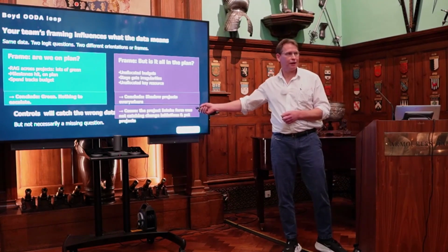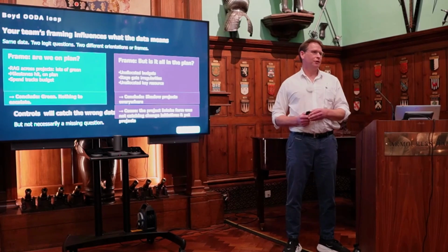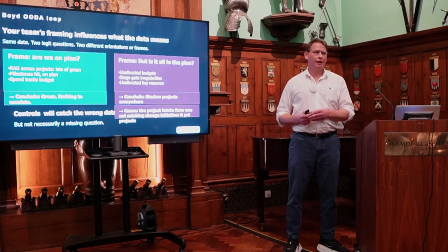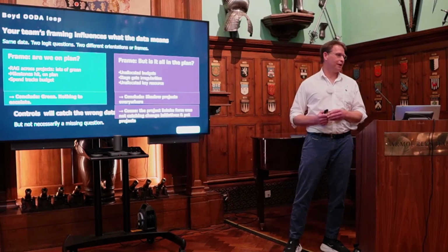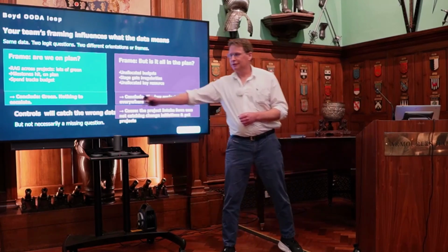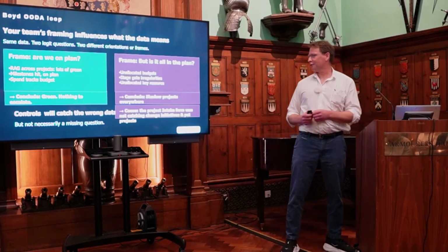And in this particular case, we tracked it down to the project intake form. There was a long, very specific form which you had to fill in to get budget, and the result was obviously that a lot of things didn't make it through. The things that got through look great, because you've already got a project manager that's good at filling those sorts of things in.